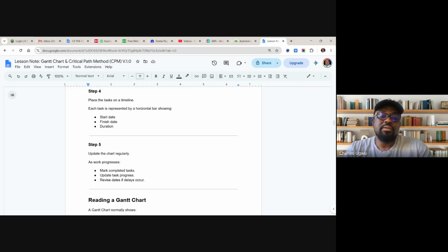And we can see the progress, we can see completed tasks and revised dates if there is delay. Once the project plan becomes live, if there is a delay, if somebody fails to complete what they're supposed to do, it will show red. So it always shows an indicator that there is delay, and any delayed activity we flag off with red color by the activity.